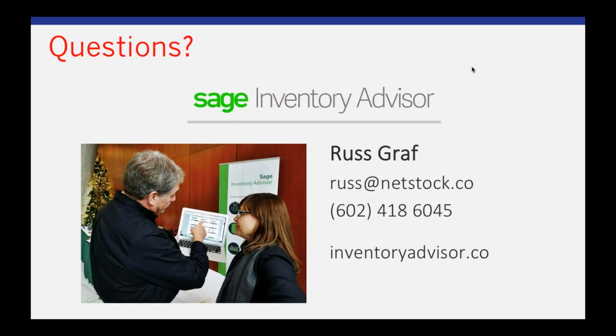But then the third step, what we call our data refinement step, is probably where we spend most of our time, doing what I just talked about, making sure that we're configuring the data that gets represented, makes sense, and that we've got all that understanding of who the buyers are and the product lines and all that. That's where we're doing some testing and tweaking. And that might take a couple weeks to work through. Then once we've got it configured the way we want, working with typically 1 or 2 lead people at the company, we turn it loose to other users and start the training process. So usually 4 to 6 weeks. If you've got a manufacturing environment with a lot of complexity or lots of different locations and warehouses, maybe that stretches out by a week or 2, but very rapid deployment, very rapid return on investment.